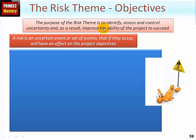Identifying, assessing, and controlling risks improves the ability of the project to be successful. A risk is an uncertain event or set of events that, if they occur, will have an effect on the project's objectives. It's important to consider the difference between an issue and a risk — a risk hasn't happened yet, and if it does occur it will have a negative impact if it's a threat, or a positive impact if it's an opportunity.